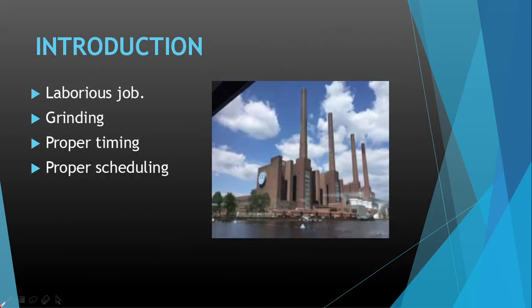Now let us see what it is to construct a factory. Construction of a factory is a very burdensome and backbreaking activity. It is a very elaborate process which requires proper scheduling. Delay in work in one activity may result in extension of the expected project length, which will lead to an increase in the cost of the budget. At minimum, construction of a factory takes around 10 months, assuming everything to be optimistic, and maximum 2 years. In our case, it is taking approximately 13 months for construction of our factory.